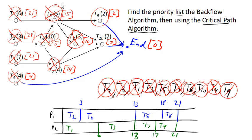So task 10 gets assigned here. And task 10 takes 7 units of time, so that's going to take us out to 28. And task 9 has time 2, so that's going to take us to time 23.